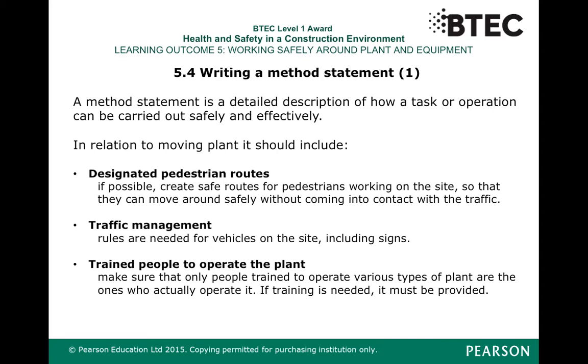Okay. Now, just some general notes. The method statements should also specify the location and the nature of the work, the dates the work will take place, responsibilities and contacts, and it may also contain a risk assessment. Some of the method statements I've seen actually do contain risk assessment, and I'll try and see if I can make available a method statement. I used to have a learner who dealt with asbestos removal, and I think he did have a method statement, so I'll try and look for that, and I'll make it available for you to see.